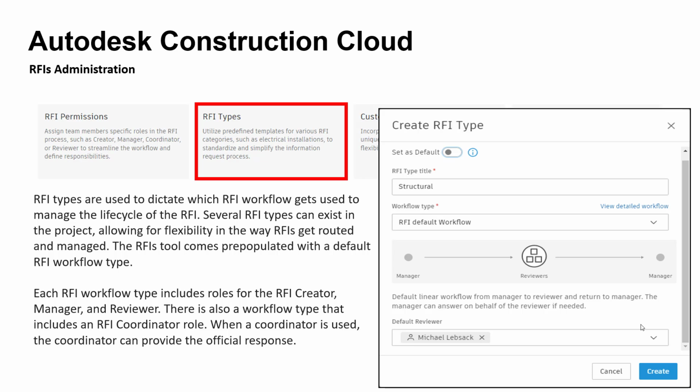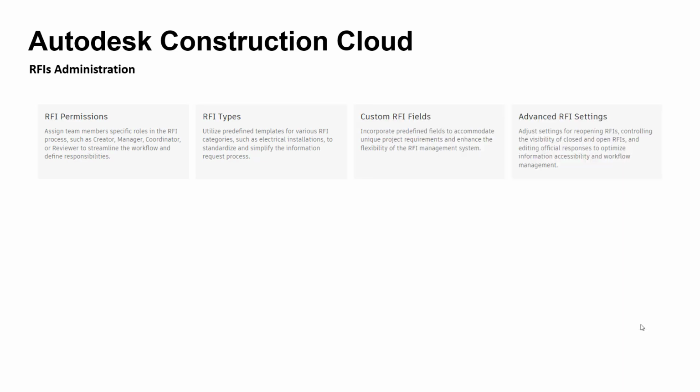The RFI tool comes pre-populated with a default RFI workflow type. Each RFI workflow type includes roles for the RFI creator, manager, and reviewer. There is also a workflow type that includes an RFI coordinator role. When a coordinator is used, the coordinator can provide the official response.